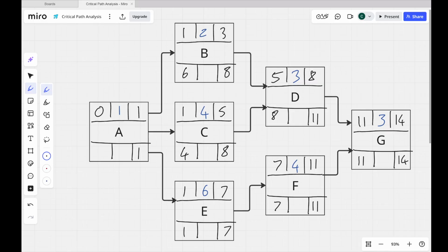And you know you've got the critical path analysis, the maths part of it anyway, right, is when you do the last, or the first task technically I suppose, the last part of this backwards pass, where you get back to the original task, so task A in this case, latest finish is 1, duration is 1, 1 minus 1 is 0. So you should get back to the first task in the sequence and have both of these numbers be 0. If they're not, something's gone wrong with your math somewhere. Or you've skewed it. You've arbitrarily inflated something somewhere, which you shouldn't do, I'd argue, with this.